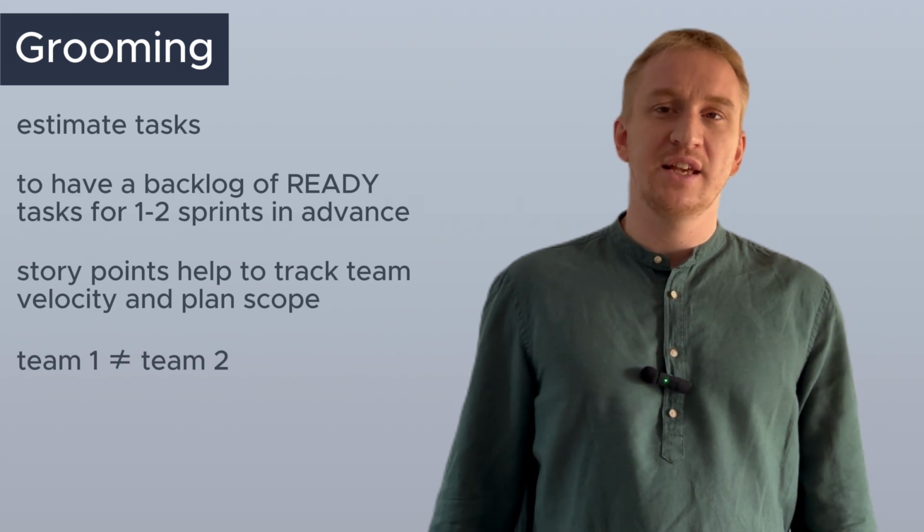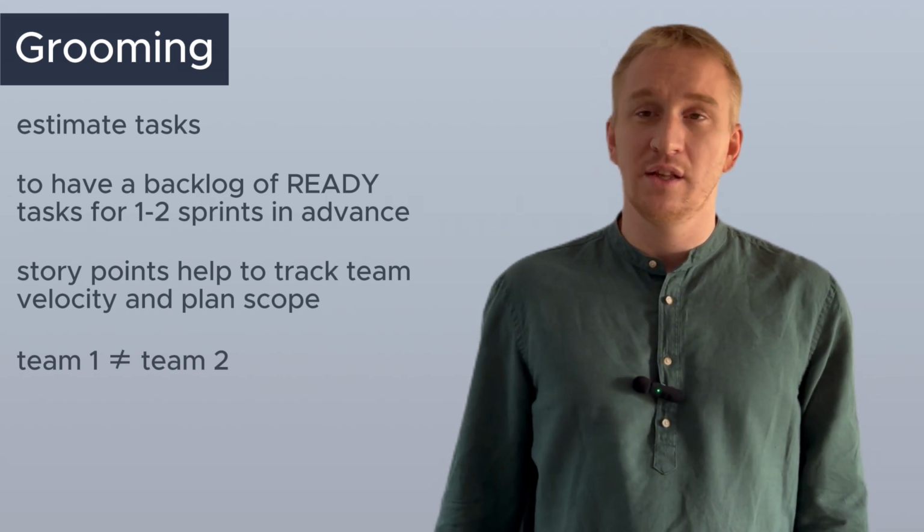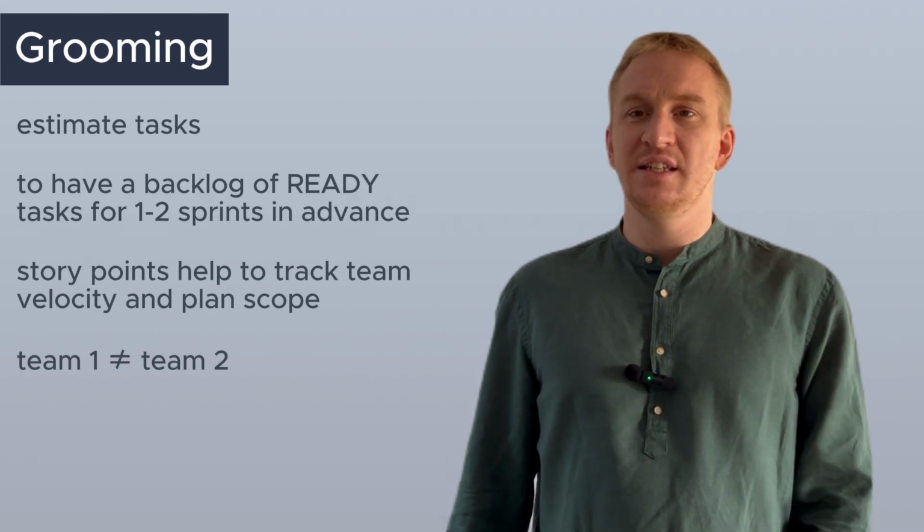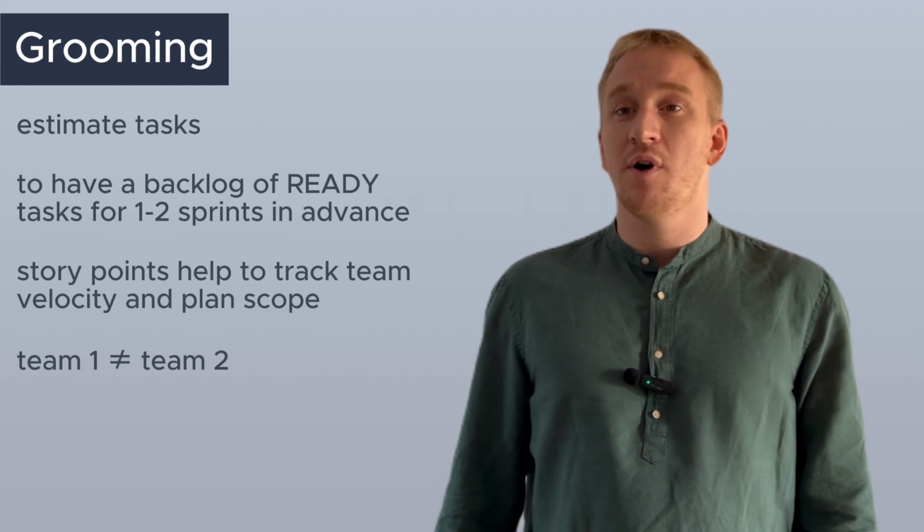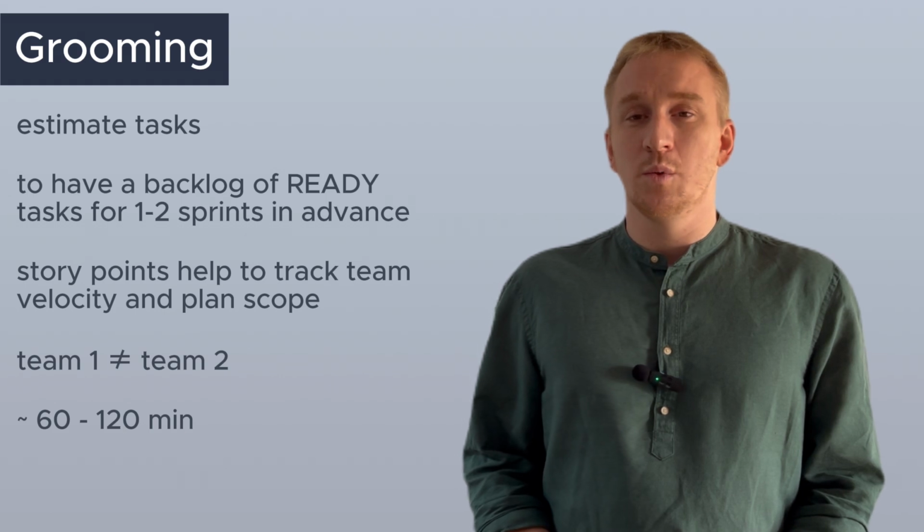That's why we need to have pre-grooming calls where the business analyst and developer only, for example 2 people, can validate all requirements inside tickets and then only estimate them during groomings with the rest of the team. A typical duration of the grooming is 1 or 2 hours.